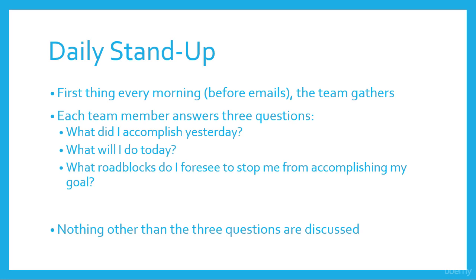So every single team member in the stand-up is going to answer these 3 questions. There's going to be different variations, but these are kind of a template to go by. So what did I accomplish yesterday? What will I do today? And then what roadblocks do I foresee that might stop me from accomplishing this goal of what I want to do today?